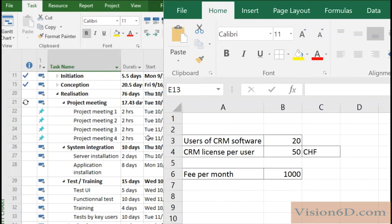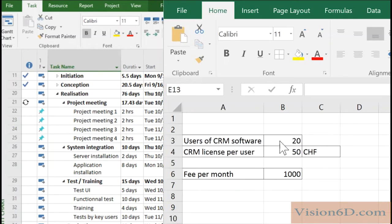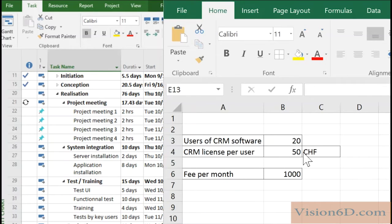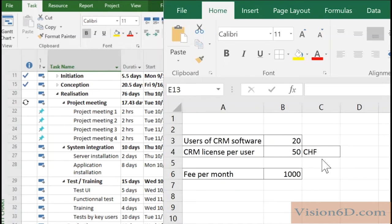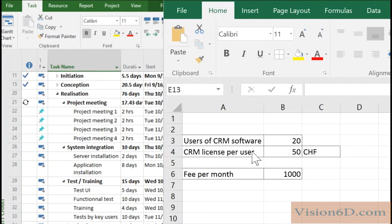So the basis of fees is that every month you have to pay a certain fee per user using the software. So here in the description it's quite simple. I have here 20 users which are going to use the CRM software, and for each user the license costs 50. So I've defined it in Swiss francs but you can define it in euros or US dollars as you want. So what it means is that every month in this project whenever we use the CRM software there is that monthly fee that if you multiply 50 per 20 users it's 1000 per month.